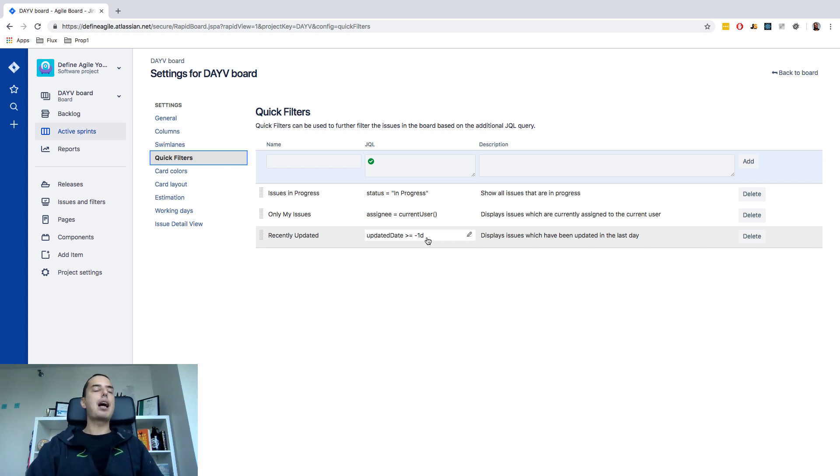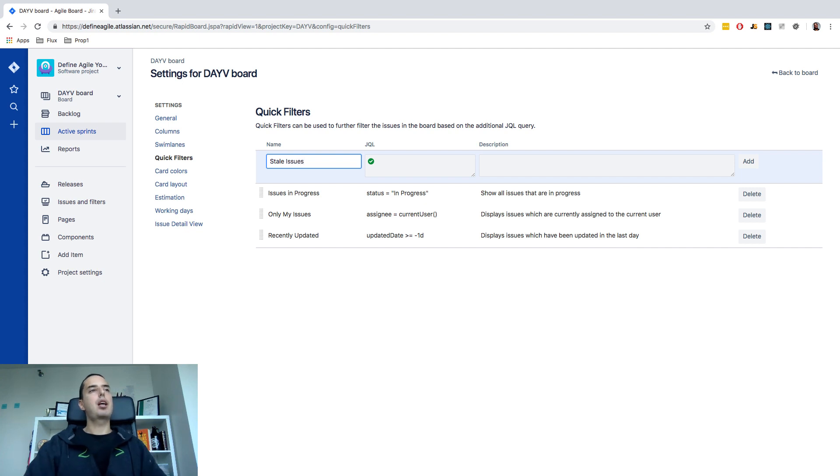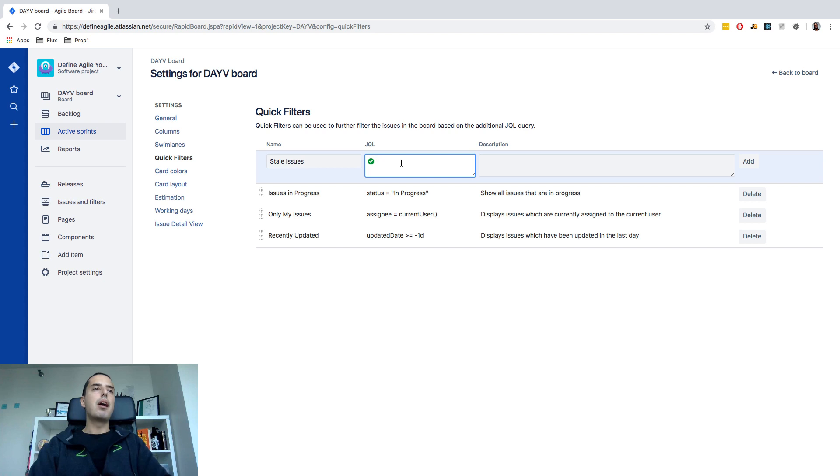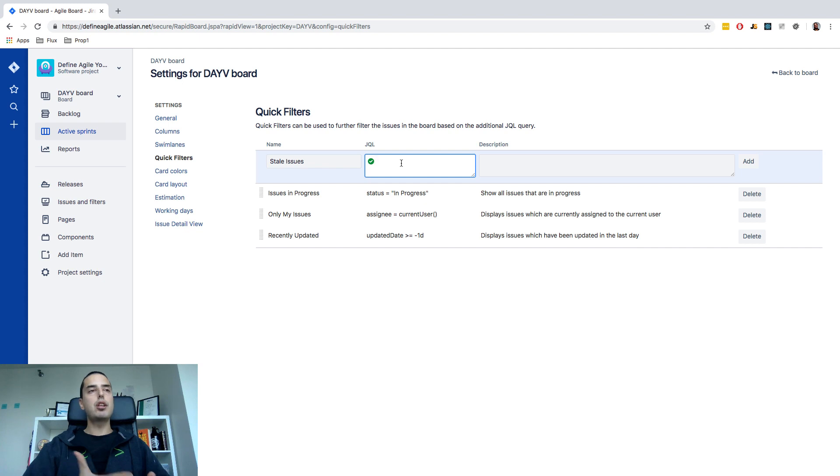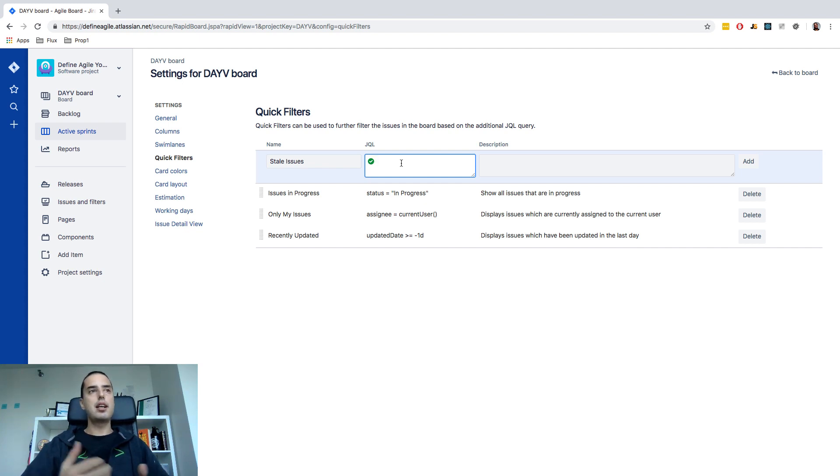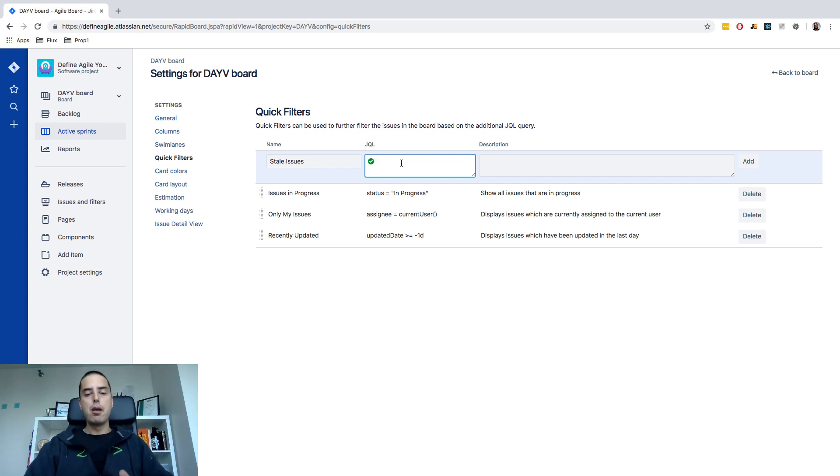So now let's create our stale issues filter. All we need to do in our name we'll put stale issues. So this will be the name that will appear in the drop down. In JQL let's write the query that we want to create. So we would like to create a query that has two conditions. One condition will be that status is not done because done issues are okay if they stay in done column for as long as they want. And a second condition would be that they were updated more than seven days ago.